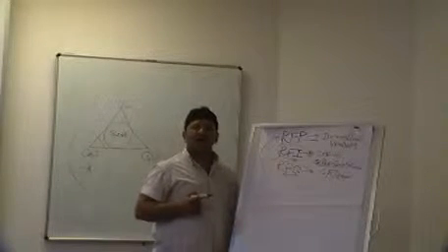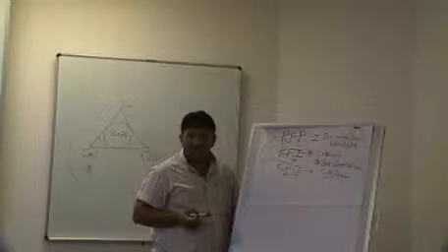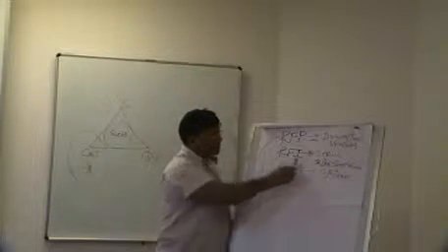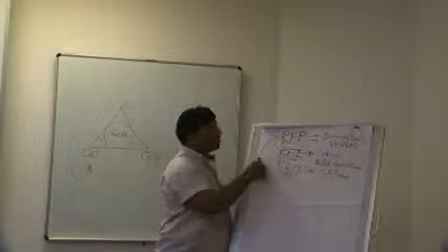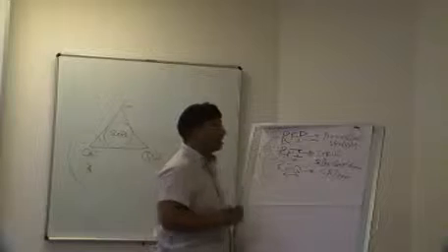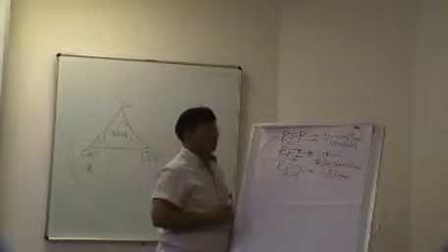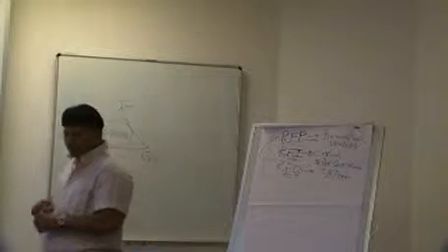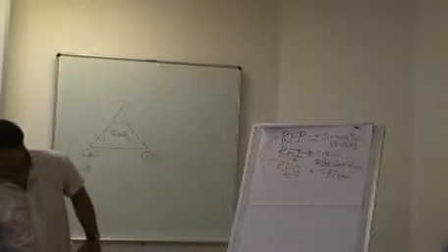Meaning, you might go out on RFI to 100 suppliers, only to find when you make a shortlist based on criteria, when you issue the RFP, you only issue the RFP to say maximum 20 suppliers. So this is a pre-qualification process leading up to a request for proposal. So that is what we mean by issue the request.